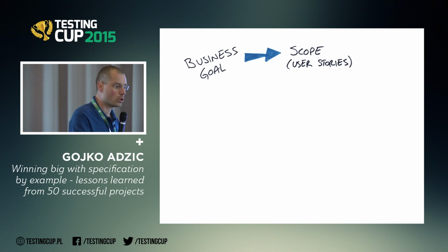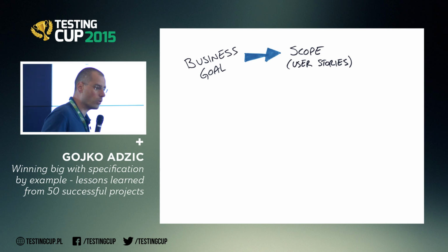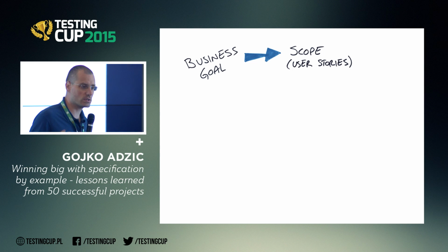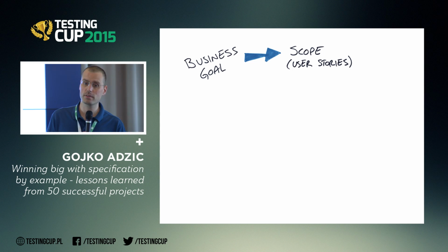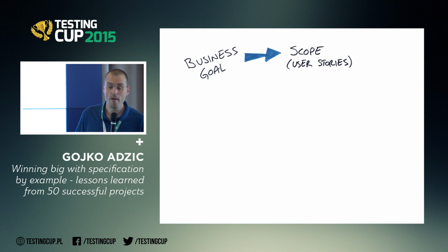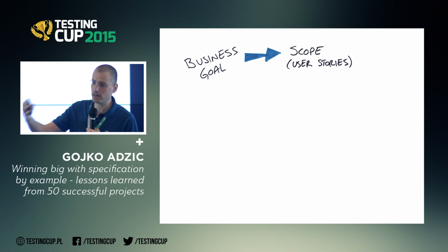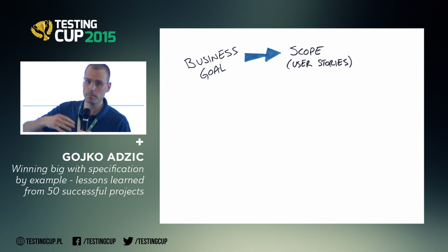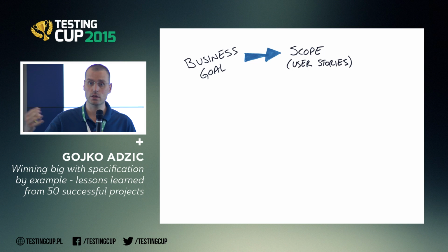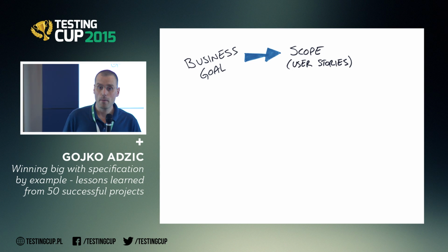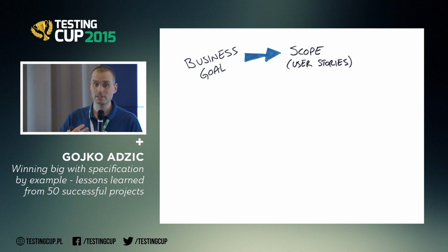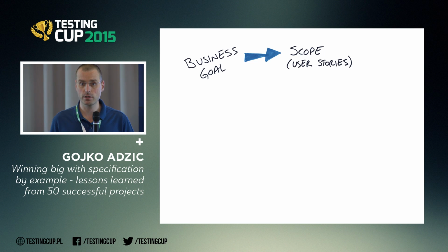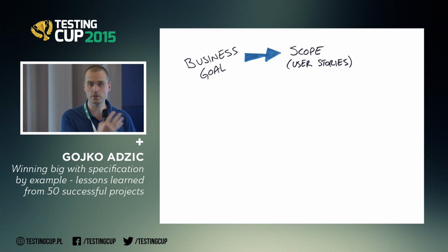So scope level requirements, user stories tend to be produced, say, 1 or 2 months ahead, or even 3 months ahead, where they're good enough for planning, where people can organize work, hire people, fire people, buy equipment, schedule work around that, organize marketing activities. But because they can produce detailed requirements and tests relatively quickly, they don't need to do that much detail up front.